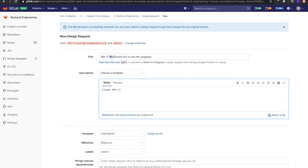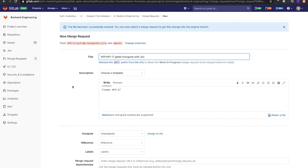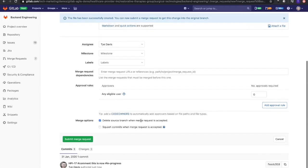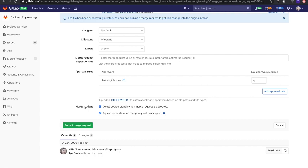If I go into that merge request now, I'm just going to say 'Create with Jira,' change that title. I'll assign that to myself. For merge options, I can delete that source branch, and I can also squash the commits when the merge request is accepted. What that's going to do - and this is your choice - right now inside that Jira issue, it's going to remove the branch and the commits from that issue once this merge request is merged into master.